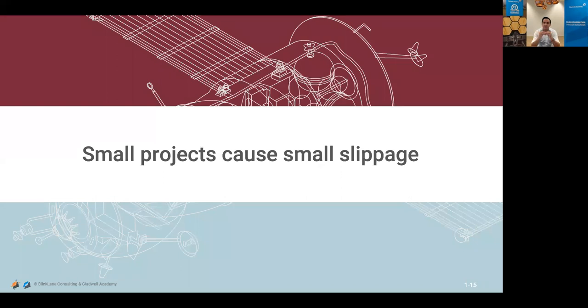And our point is, how about we see our work in such a way that we can have small projects. And therefore, we can iterate through the value stream, and one iteration is a project where for every tiny project, we design something, we create something, we test something, and we learn something, which basically means that overall you have a verifiable tiny project. And a tiny project has less project slippage. So it's more overseeable, and you have the ability to maneuver what you're doing. So essentially maneuver the work, and therefore see what is the important work, something that is really necessary for creating value, and what is relatively less important.